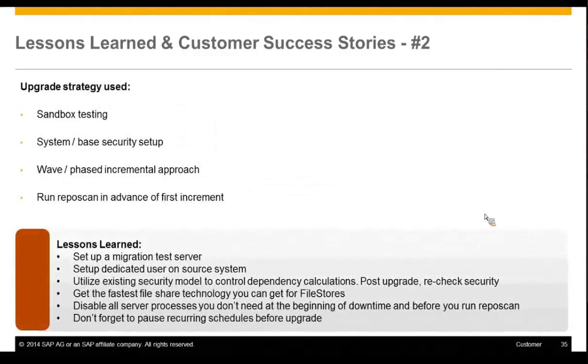The upgrade strategy, because it's a massive deployment, they wanted to do sandbox testing. Pretty much everything that they will do, they wanted to run it in the sandbox, and then for security, they did a base security setup before migration, and then expanded the security model after the upgrade, in an incremental approach.